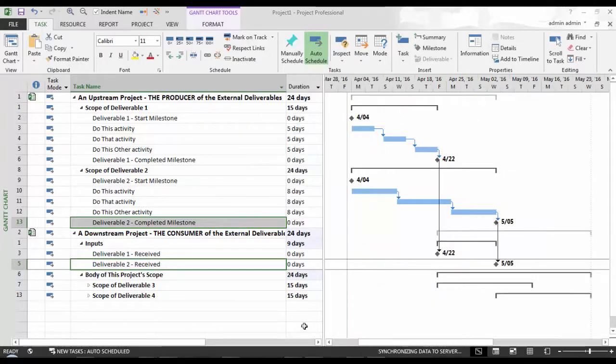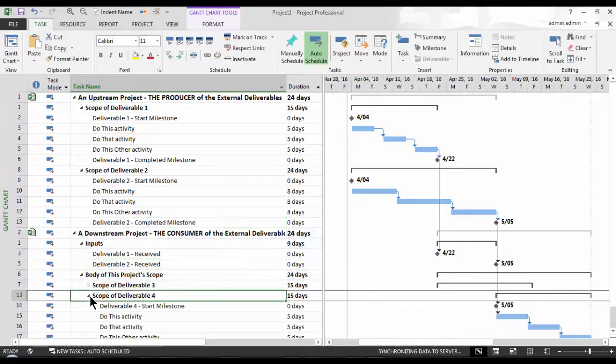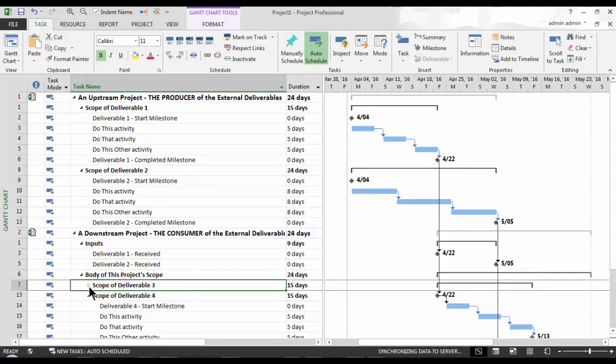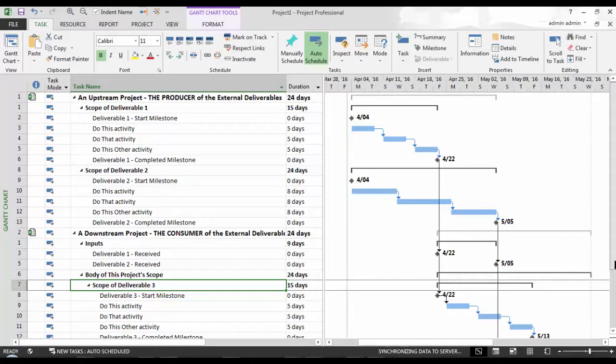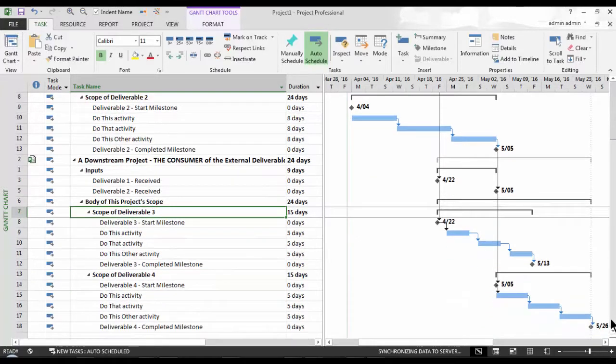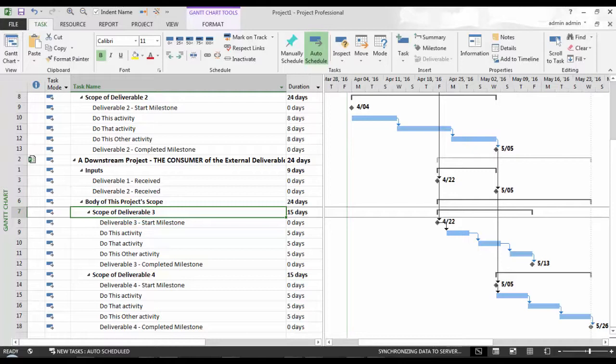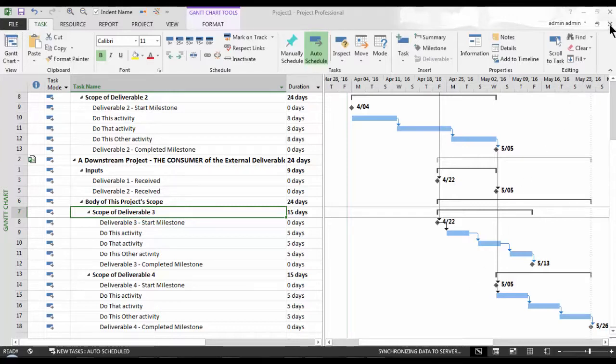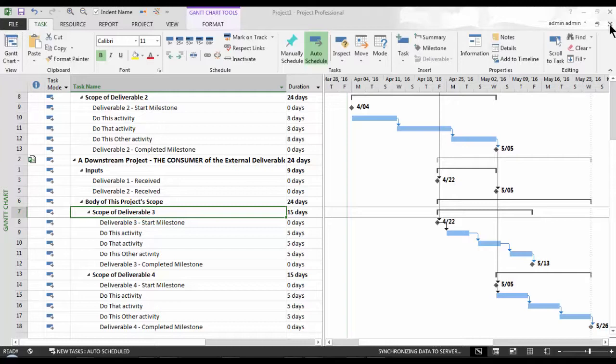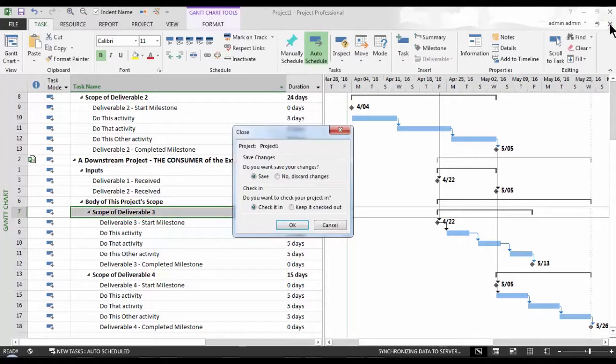Using a naming convention and setting up our WBS, short for Work Breakdown Structure, will facilitate this sort of operation and help to clearly communicate the different WBS elements to your stakeholders. We'll zoom out once again. As promised, I'll expand the details of Scope of Deliverable 3 and 4 so we can confirm that the tasks are linked. The physically linked network of tasks represents the dependencies between our tasks in both files. I like to call these hard dependencies in comparison to deliverables that I sometimes call soft dependencies. Now, I want to save and commit my changes to my sub-projects. In this particular case, I don't really care for my master—this file served as a shell to allow me to set up my project interdependencies, so I will discard it.